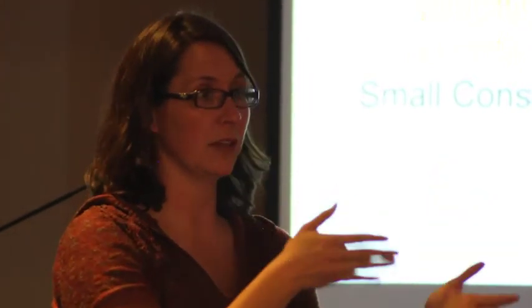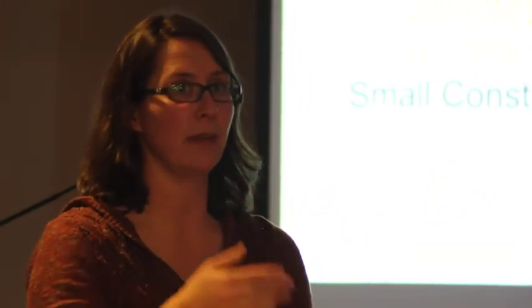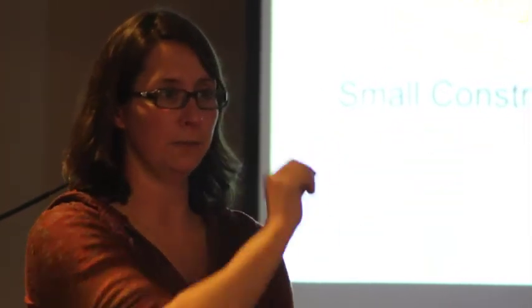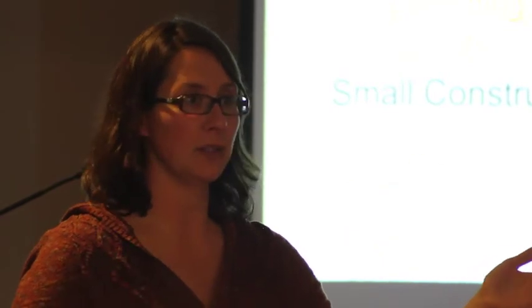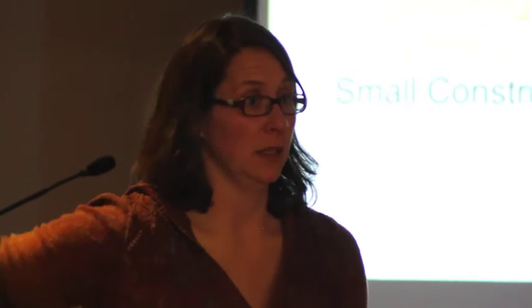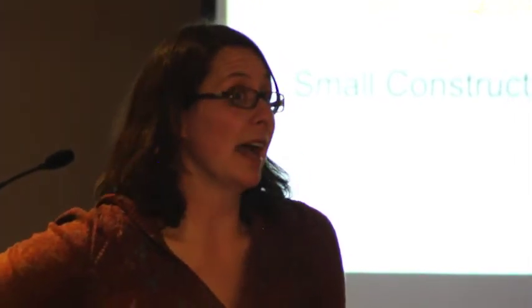If you've changed other practices in your SWPPP, if we were talking about those major sequence of events, if you finished grading, then you would put "finished" and a date and just update that SWPPP as you go. If you installed a BMP and you found out that BMP wasn't working, change that in your SWPPP. So it sounds like what you're saying then is that, maybe to keep my map from being congested, I can keep track of little things like that, okay, grading finished on such and such a date. Yeah, that goes in your SWPPP.